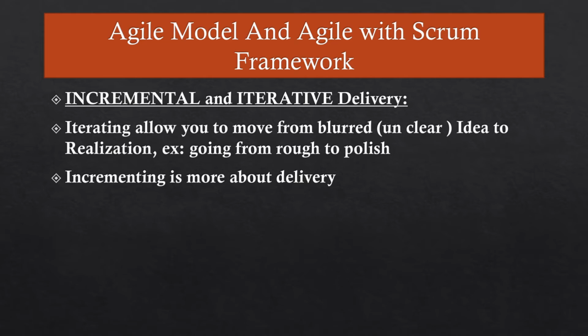If there are any remaining features to be added, they cannot be delivered in the first iteration. If any new features come, we are not going to deliver those newly added features the first time. These new requirements will be added into our next iteration. And not only the next iteration: if there are subsequent iterations, we add all these new functionalities into those iterations based upon priority.